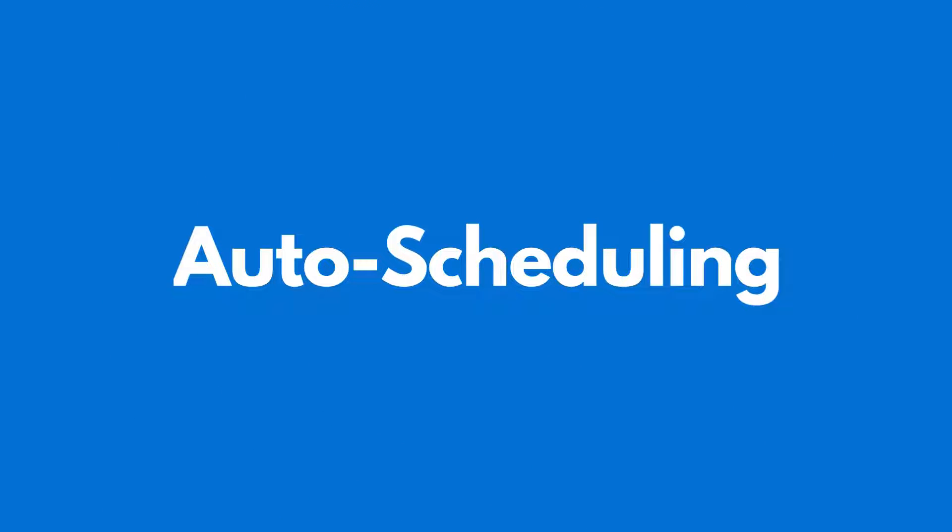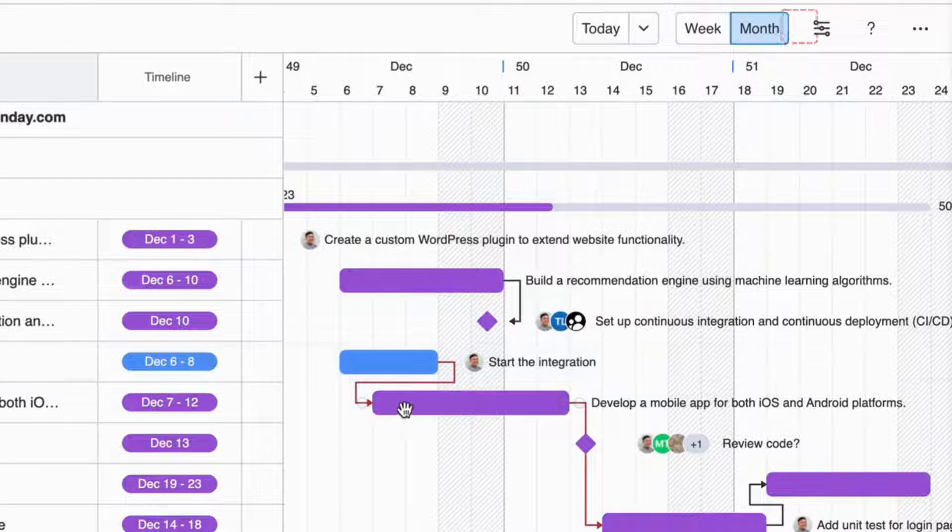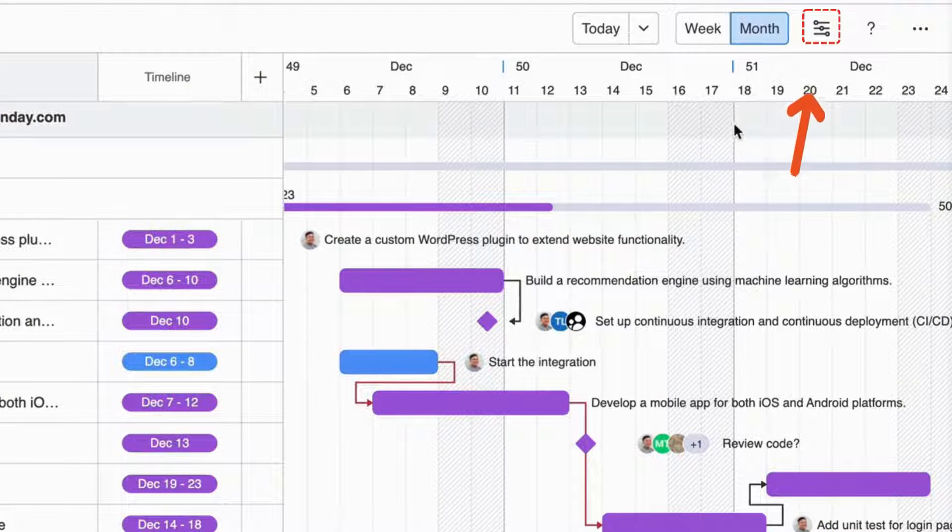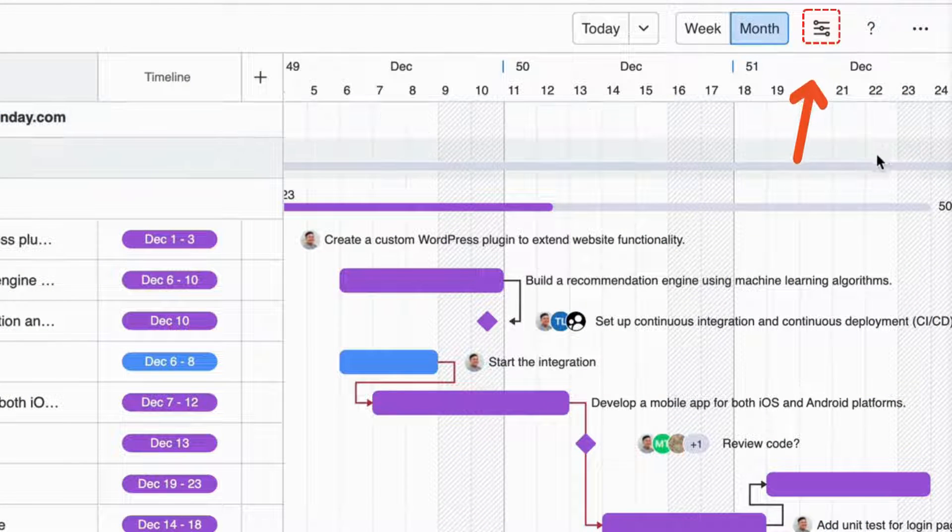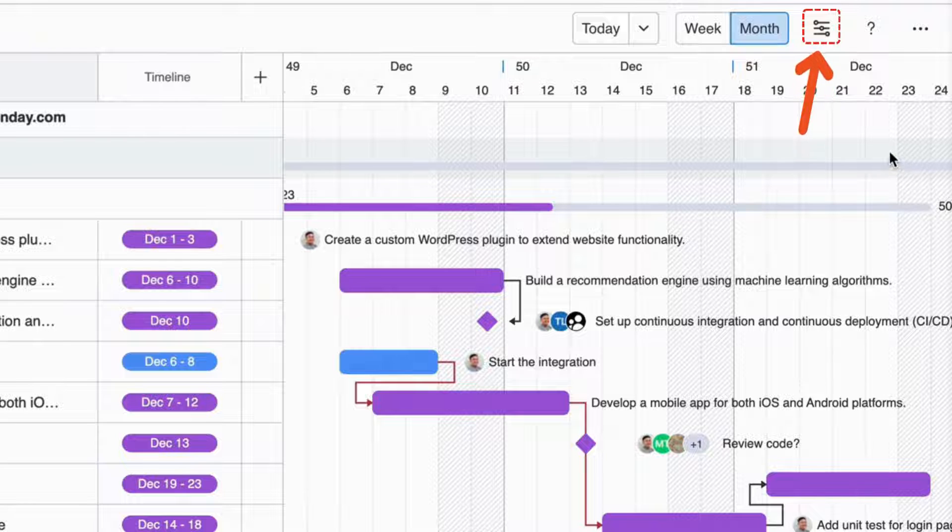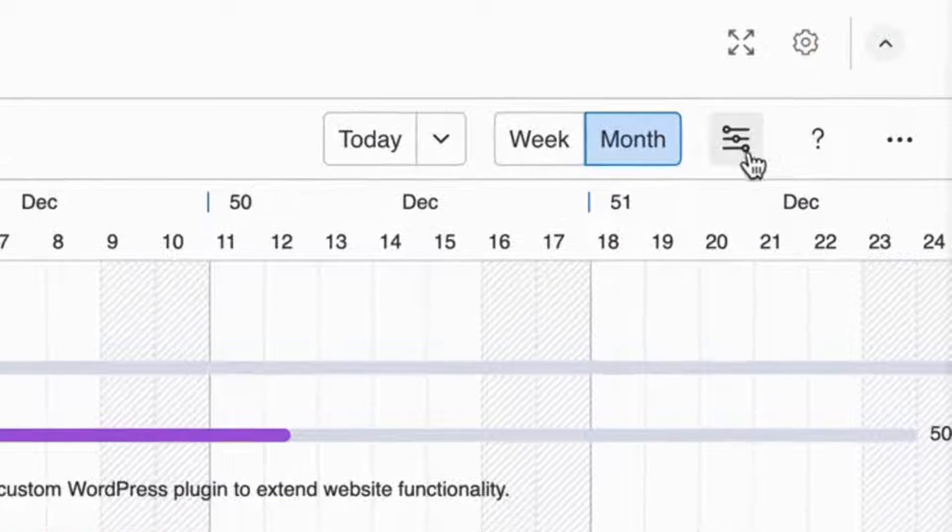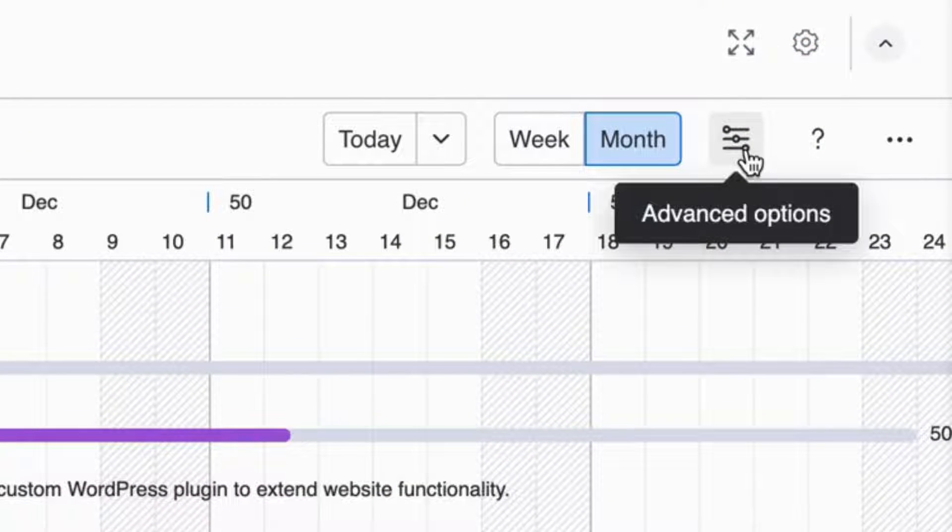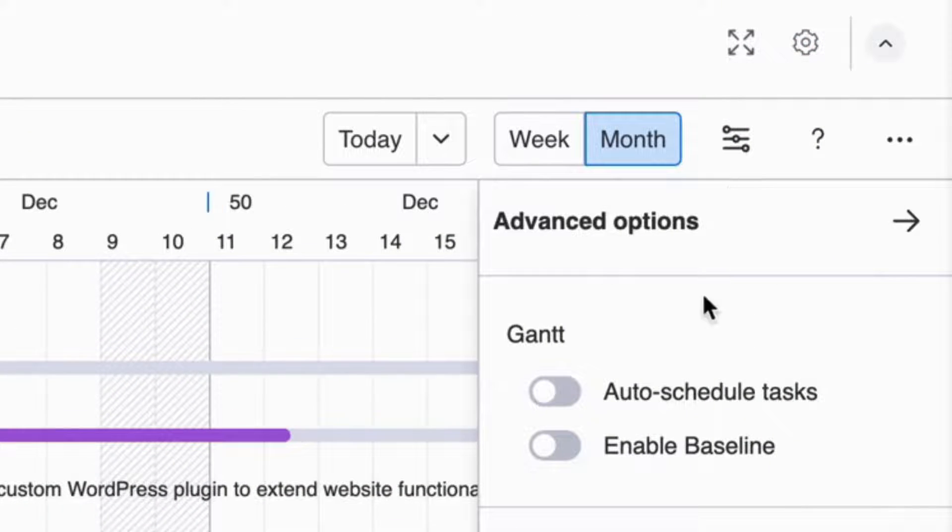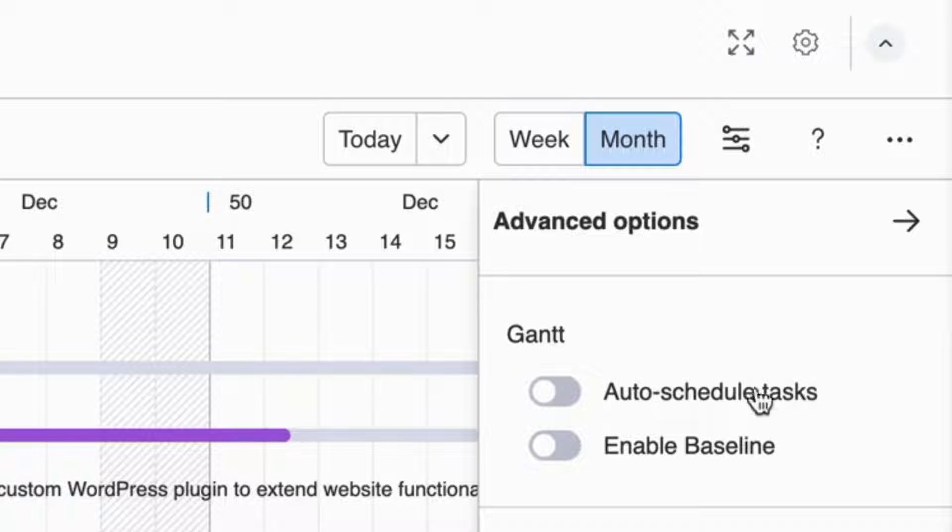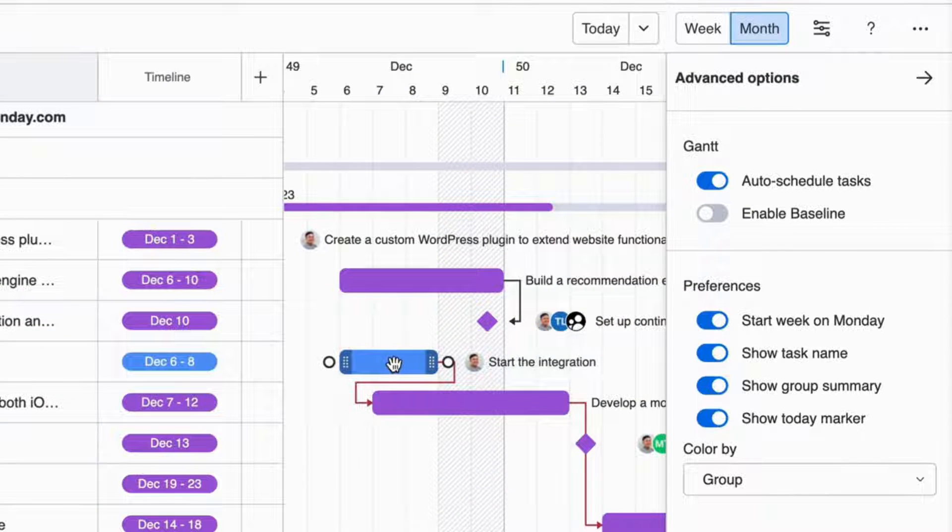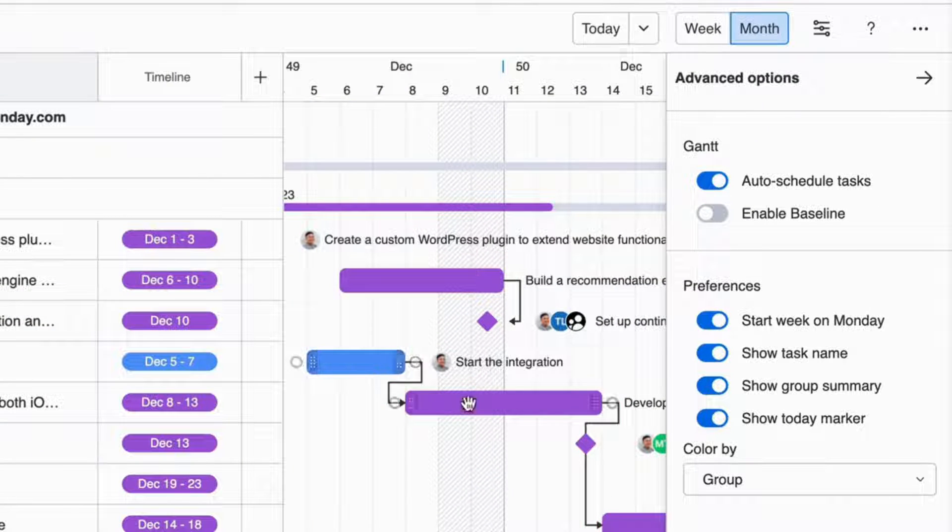Besides visualizing dependencies, the app also offers an auto-scheduling feature. All you have to do is to turn this feature on with just a click. It will automatically manage your tasks and appointments after creating those dependencies. So, you can still get a streamlined calendar without much effort.